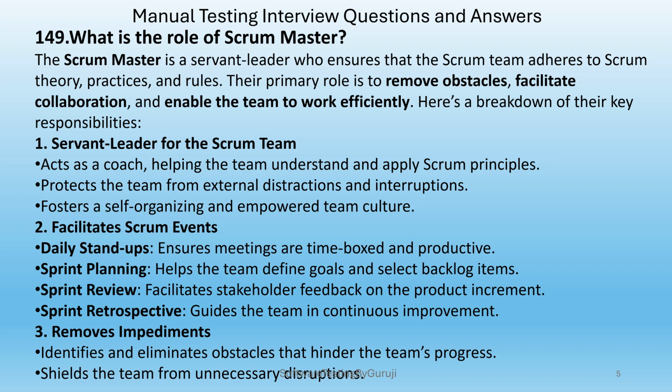Second, facilitates Scrum events. Daily stand-up: ensure meetings are time-boxed and productive. Sprint planning: helps the team define goals and select backlog items. Sprint review: facilitates stakeholder feedback on the product increment. Sprint retrospective: guide the team in continuous improvement.